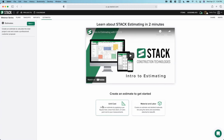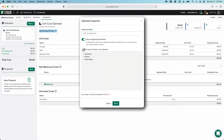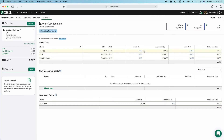Unit cost — click on that. This is where we can start to utilize some of the label work that we did. It's going to prompt and say, hey, do you want to give this estimate a name? We'll default a name if you want, and you can hit save and continue. But this is where you can filter. By default, we're going to include everything that you've measured. But you have complete control — I can say I don't want to include everything, I want to only include my phase one work, and this will filter out so I'm only dealing with my phase work.